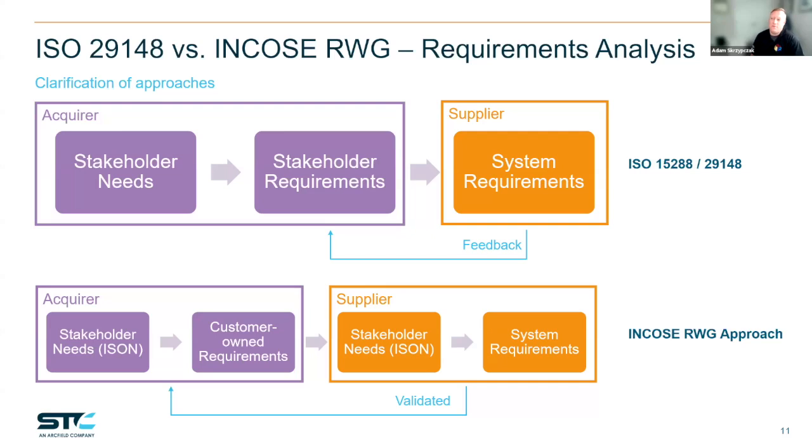Yes. Now we've been using this since February and we've been noticing that too. Doing this needs approach by sitting there and consolidating and reviewing these existing documents, we have been identifying requirements that the customer just didn't have and bringing that to their attention. In one case, on one project for the Army, we've actually had them go back and update their initial capabilities document based on our findings because they missed a bunch of stuff. And part of that was from the lifecycle concept identification. Like, the system at this point in the lifecycle, you have no requirements, you have nothing covering it, but these are pretty important impacts on your design, on your acquisition.